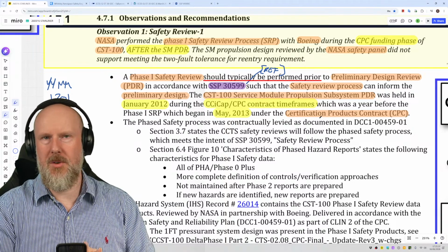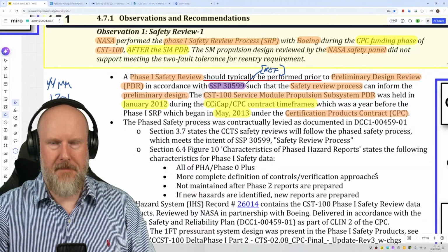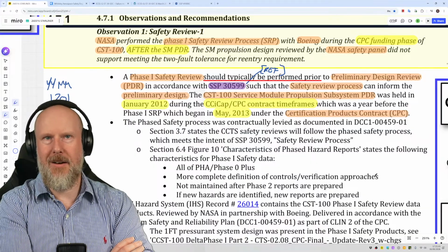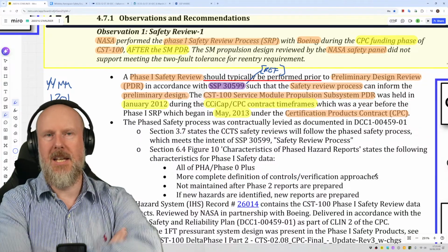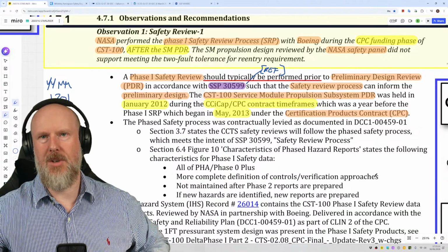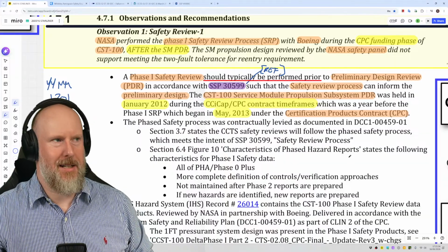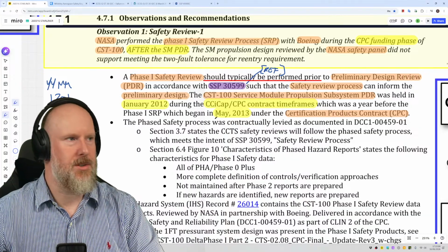There should be no opportunity for a supplier to say, "Oh, well, you didn't tell us, tier 1 contractor, you didn't tell us about XYZ hazards, so we've not mitigated it. So you need to pay us more money." That's not how the safety process and the contract process should work, and that should be carefully managed. You should have a safety manager involved in those kind of discussions.